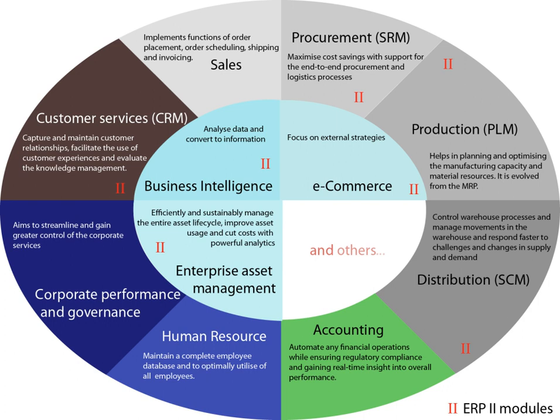ERP scope usually implies significant changes to staff work processes and practices. Generally, three types of services are available to help implement such changes—consulting, customization, and support. Implementation time depends on business size, number of modules, customization, the scope of process changes, and the readiness of the customer to take ownership for the project. Modular ERP systems can be implemented in stages. The typical project for a large enterprise takes about 14 months and requires around 150 consultants. Small projects can require months; multinational and other large implementations can take years.